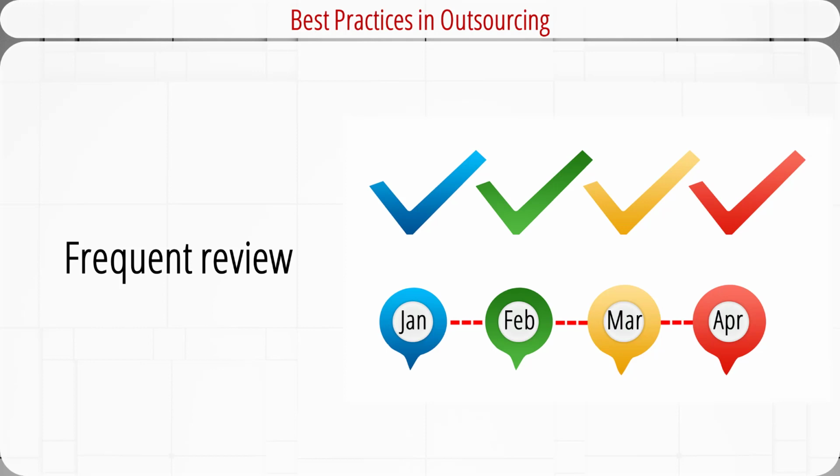Another best practice for outsourcing is to perform frequent reviews and status updates. More and more companies are using web-based online surveys to collect data from all project participants about the quality of working relations. The questions can be related to communications, top management support, and responses to issues and concerns about all the aspects of the outsourced project. Survey results will be reviewed and used for monitoring progress and identifying potential problems in interorganizational relations.